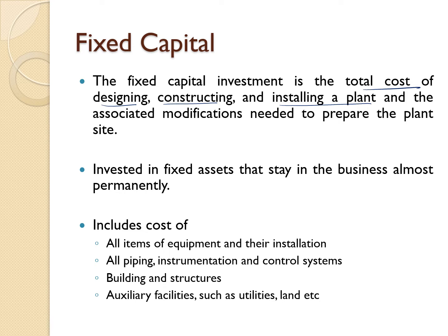This fixed capital is invested in fixed assets, so basically, this asset will permanently stay inside the business. What we can include in the fixed capital is all items of equipment and their installation, all piping, instrumentation and control systems, buildings and structures, and auxiliary facilities such as utilities, land, buildings, etc.